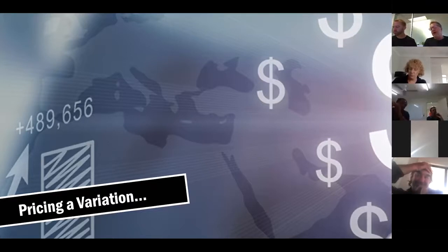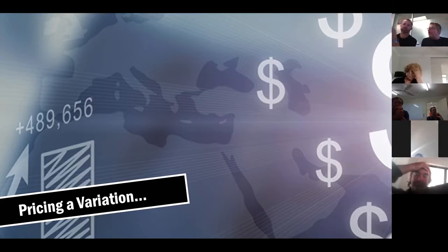But margins, we change it from the type of work we're doing. Some variations are a lot more materials than labour, some are a lot more labour than materials. If our variation is only subbies, like a new hose tap or a new PowerPoint, they change a little bit. But the same process is there, all the admin fees, all the project management, that's all just standard set.